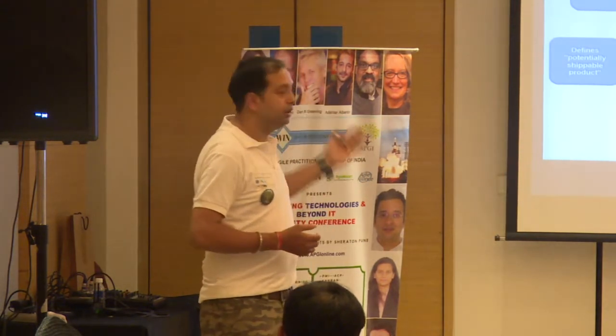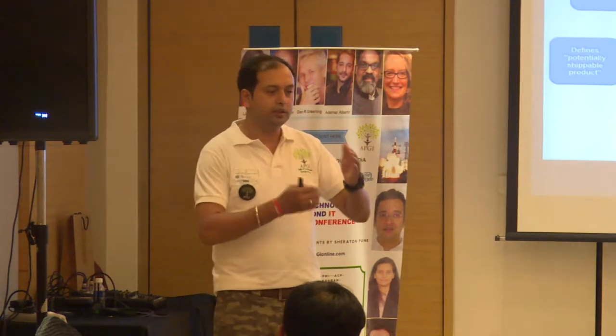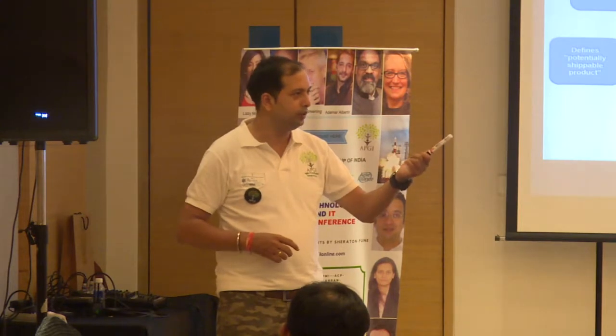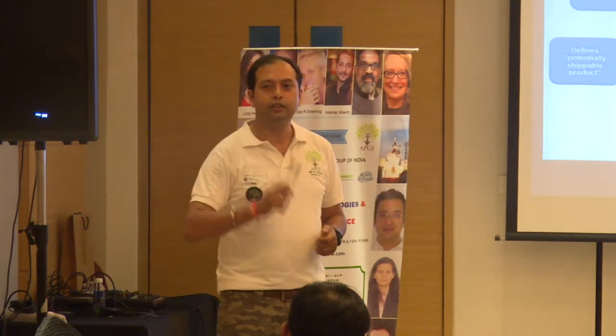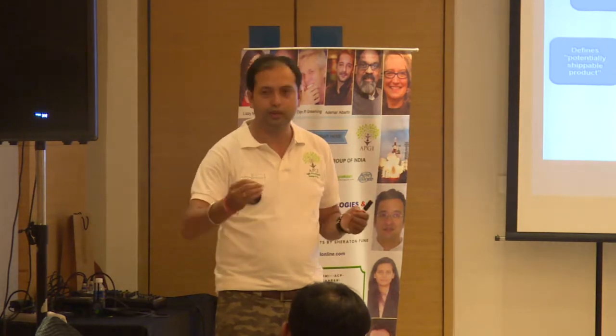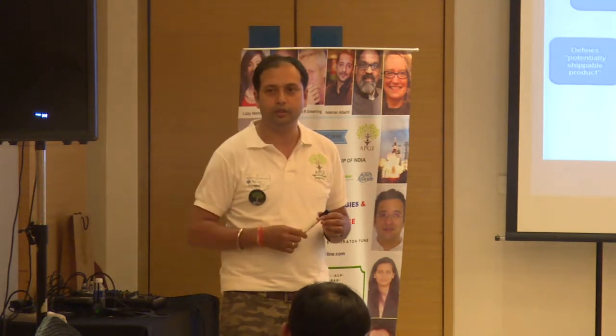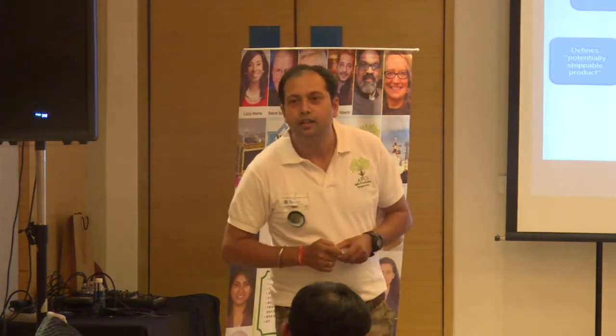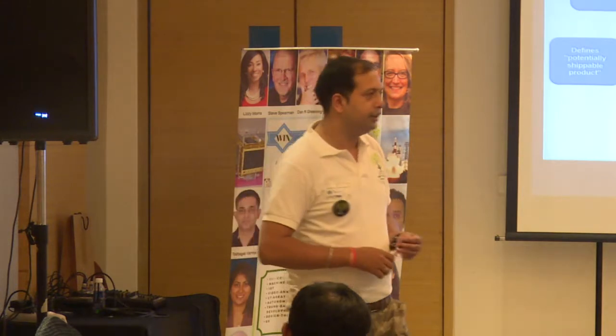And DoDs are not a dead document. It's not something like a product. Okay, one question, which is in the quiz also, I think, which is running. Who is responsible for the DoD? Who is the guy who should define this DoD for the team? Yeah, the development team should sit together and decide. Exactly. It's the development team.